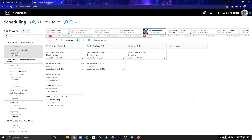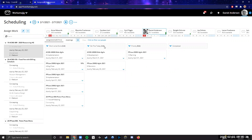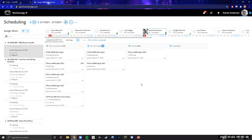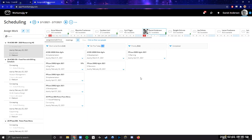One other thing to point out from a resourcing perspective: each column has a number next to it showing the total hours in that column for the period. So 'Do This Today' might show 3.4 hours, and 'Work to Be Done' shows 3.4. If you move items over to 'Do This Today,' you'd probably be soft-targeting about an eight-hour workload for that day, and this number tells you how many hours are currently in that column.